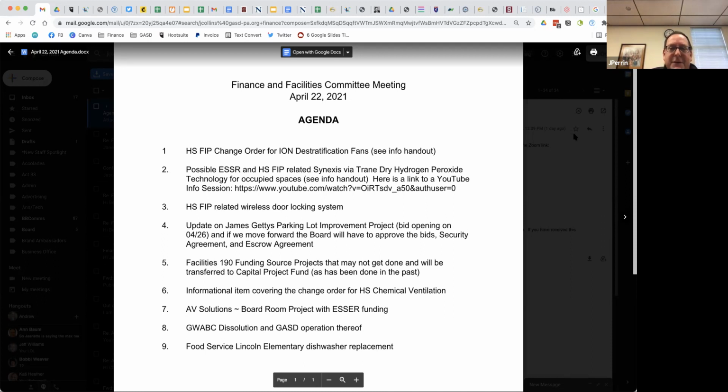So it was nice to be able to set a limit and bring the ones to the board that need to come to the board, and enable me to okay the ones that are $3,000. Yeah, that makes sense. And communicating that to the full board would be important also, because there will be more change orders. The project's just getting started, and things happen as you get into the demo and then installation processes.